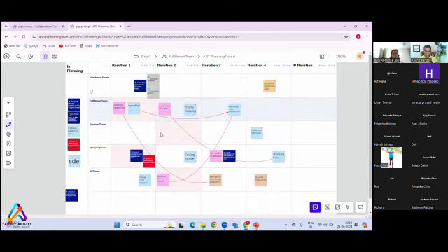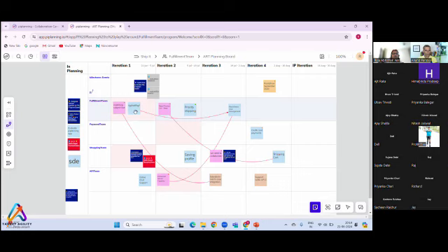This is very important. This is your dependency board. This is the feature I have created, and I have linked this particular dependency to this particular feature. Here you are seeing all the teams. I have 1, 2, 3, 4 teams here, and these are the iterations. If a feature is staying here, it means that the fulfillment team has to complete this feature in the first iteration. If the online chat support feature is there, it means the API team has to complete this feature in iteration 1. And these are the dependencies.